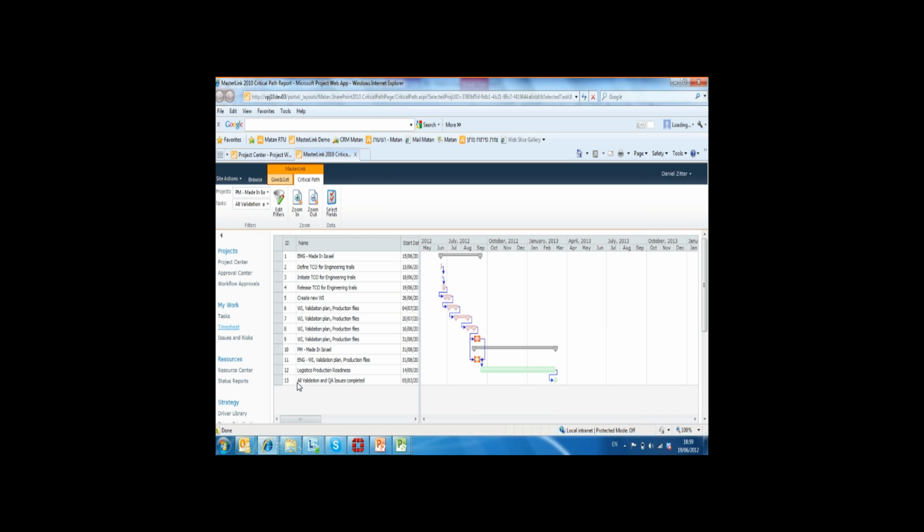He chooses a milestone within his project. And when he goes to the view here, what he sees is the critical path not only from his project file, but because there's a work package that details something out from his project to another project, you can actually go ahead and find the critical path that is actually coming from the engineering file. Hope that answers the question. The project manager is the one in charge to raise the flags on that.